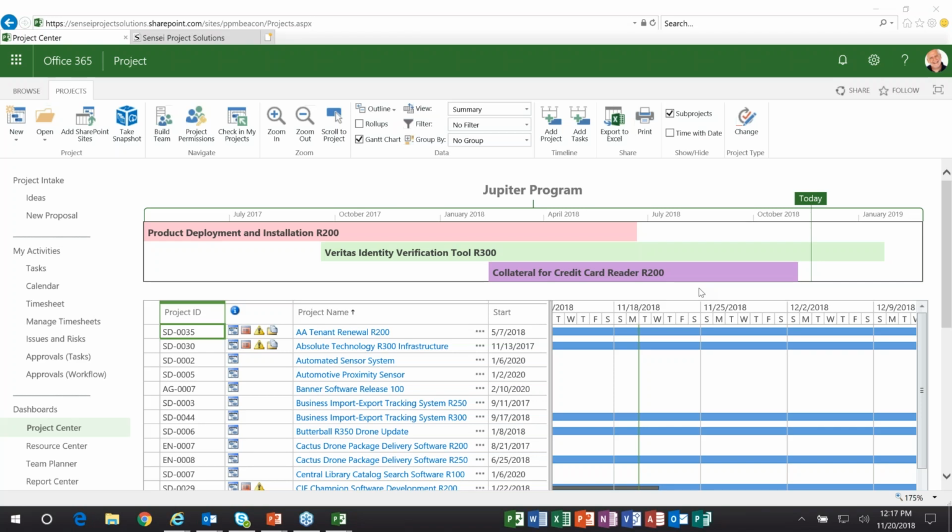The reason is every time you open a saved master project, it opens all of the sub-projects read write. They all open at the same time in the background. And when you have cross-project dependencies, it can take a lot longer.